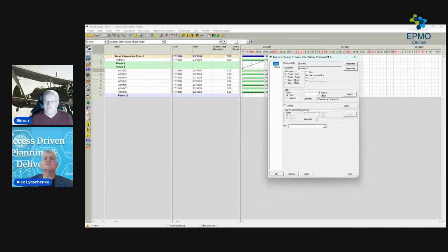And it immediately asks me what type of activity I want to do. It's the 4 standard types. From a lag perspective, it has 2 types of lags. It can be done based on time, but these can also be done on volumes, because this is volume or productivity based. Say I have an activity of 100 meters. My lag is 10 meters, not 10 days, not 10 minutes, it's 10 meters. When 10 meters is achieved, I can start. So if my 10 meters take 2 days, that's a starting point.